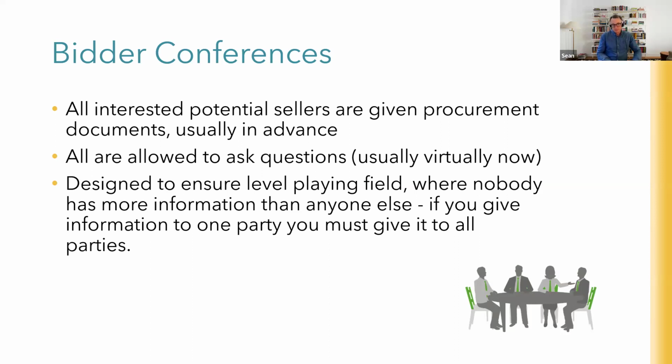The rule is, and this will be in your procurement policies and in your national law, but it's also in the PMI Code of Ethics, about being completely fair to everybody, not favoring one party over another. You could break ethics by favoring one party over another. You could breach your organizational policies, but you could also breach relevant laws that govern this sort of thing in your country. So it's really important that all potential sellers are given all the procurement documents equally, at the same time.